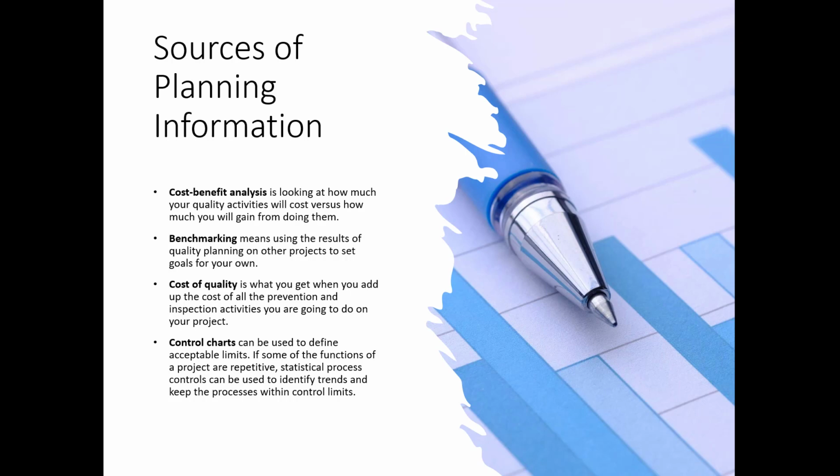Planning for quality is part of the initial planning process. The early scope, budget, and schedule estimates are used to identify processes, services, or products where the expected grade and quality should be specified. Risk analysis is used to determine which of the risks to the project should affect quality.